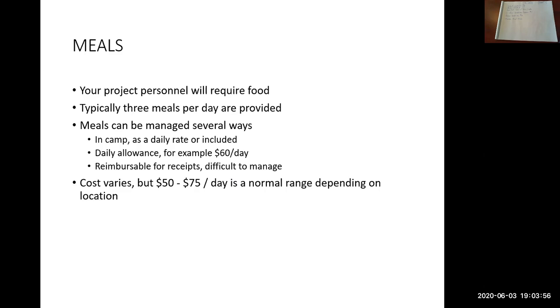Again, the food allowance is not per work day, it's per calendar day. So if your crew is working 6 days a week, but your crew is in that town 7 days a week, so they get a day off, but they're still in that town, you still have to give them their daily meal allowance, even though they're not working.